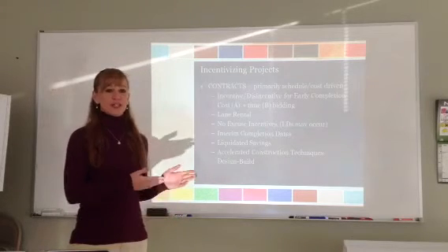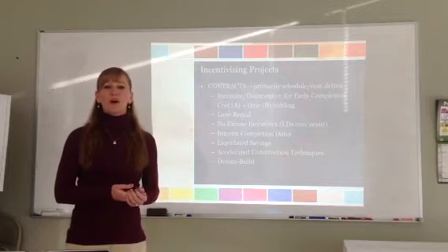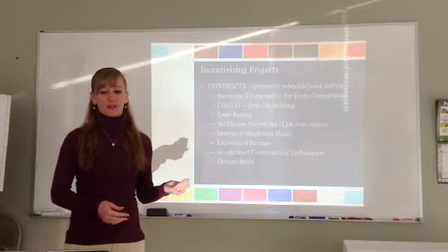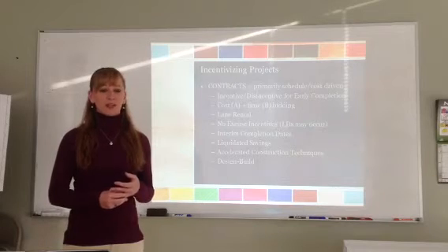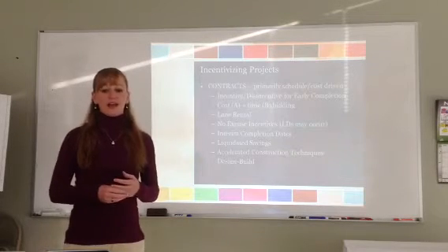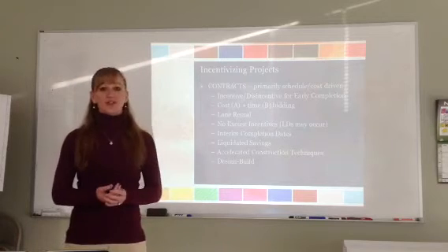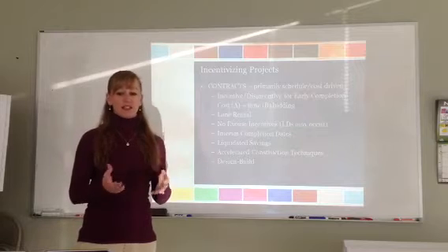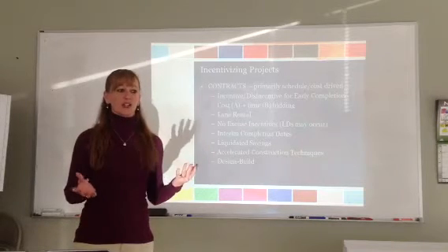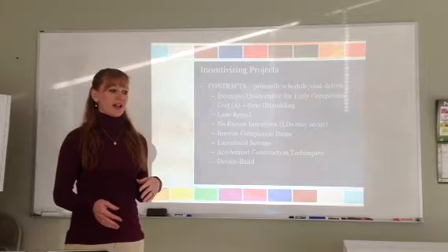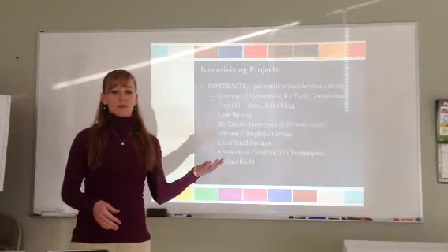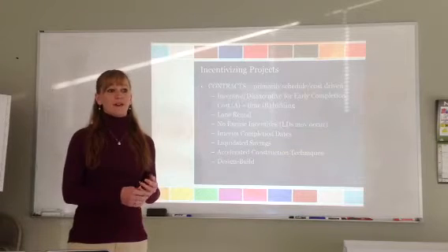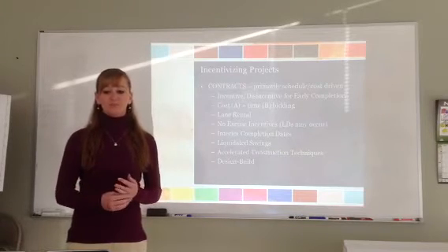So, talking firstly about incentivizing projects. Whether it's a critical project or a regular project, we're going to look at the contract first. Contracts are primarily driven by cost and schedule. And here are 7 examples of different contracts I found in my research. The first one being incentivizing or disincentivizing for early or late completion. This is providing a monetary value of some sort to the contractor if they complete the project ahead of time, or the contractor paying the owner if it's late.